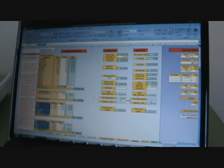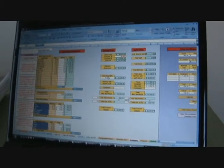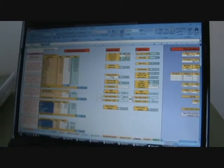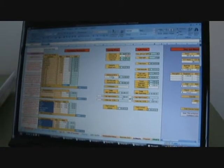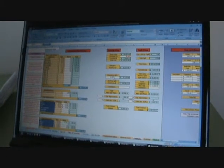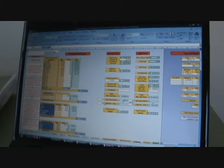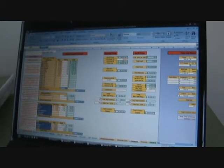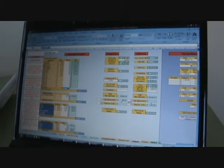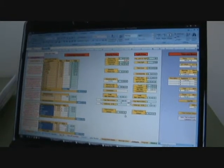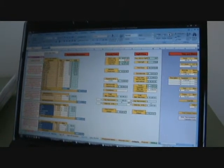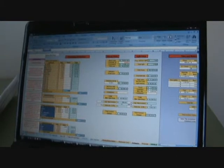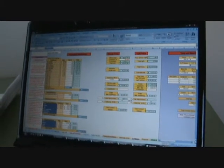Here's your profit. You can vary that. 10, 15% is pretty much standard. Sometimes I go a little higher. And then you got capital, you can plug in your sales tax amount if it's a capital improvement or all taxable. Different states are different, so you'd have to go by your state.